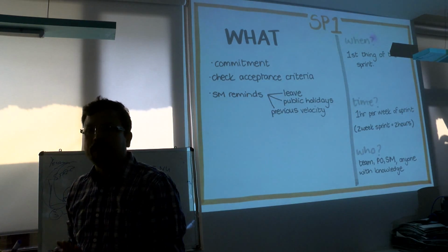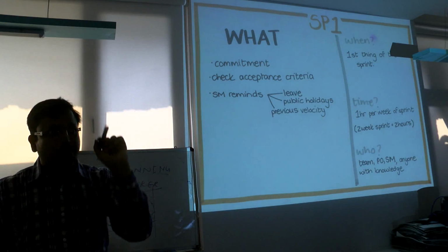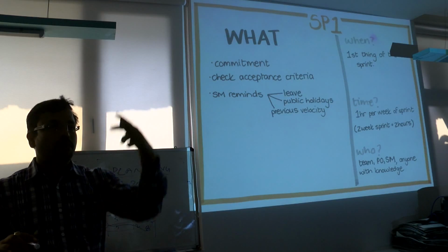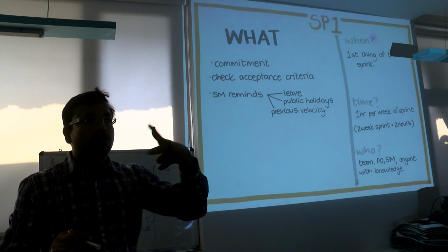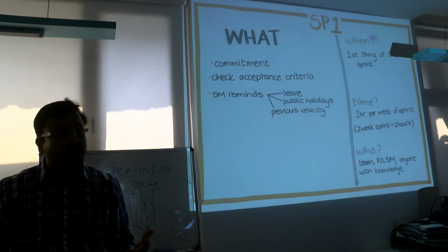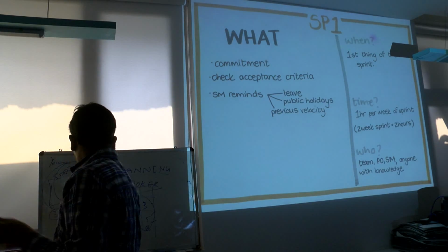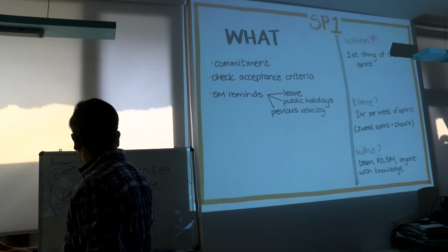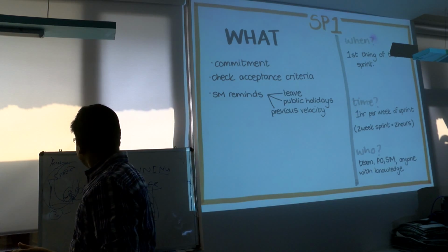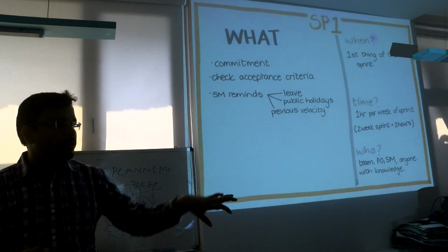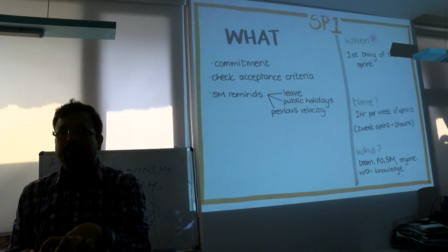A Scrum Master will be there. The team will go through the product backlog in priority order, not the whole backlog, only by priority. Based upon their velocity, the Scrum team will give the commitment. If there are 4 stories totaling 26 story points, and our velocity is up to that, then the stories will come into this sprint.